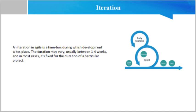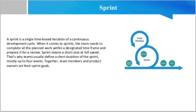Generally, iterations follow calendar weeks, starting on Mondays and ending on Fridays. This is more of a convention than a recommendation, as different teams adopt different conventions. The fixed length of an iteration provides teams an opportunity to get an accurate estimate of how long it takes until the project is completed. Iterations offer a predictable, regular cadence to form increments of value and improve previously developed increments.